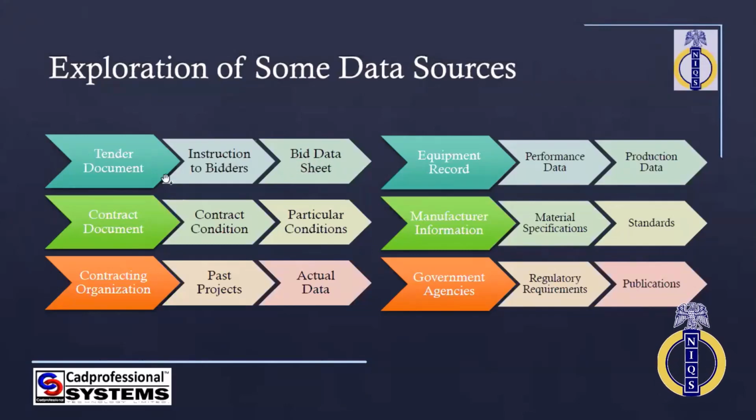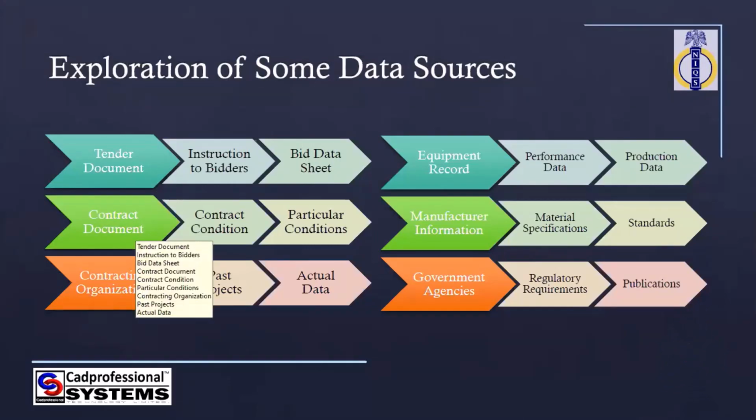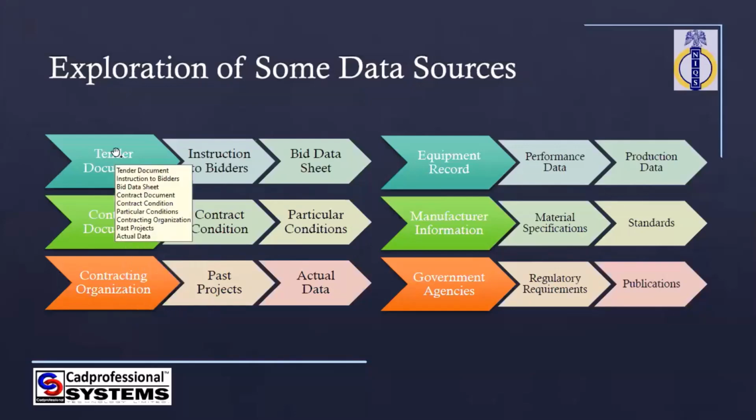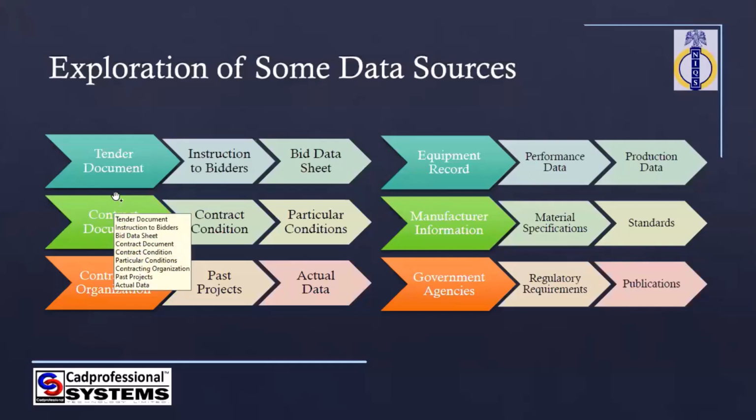Another thing I called attention to was the data that we receive from the contract document itself. There is a big difference between tender documents and contract documents. Tender documents are the documents that guide your preparations towards tender, whereas contract documents are about preparations towards delivering the project. They guide you on the processes, the obligations, and the responsibilities of parties in achieving the goal of the project.